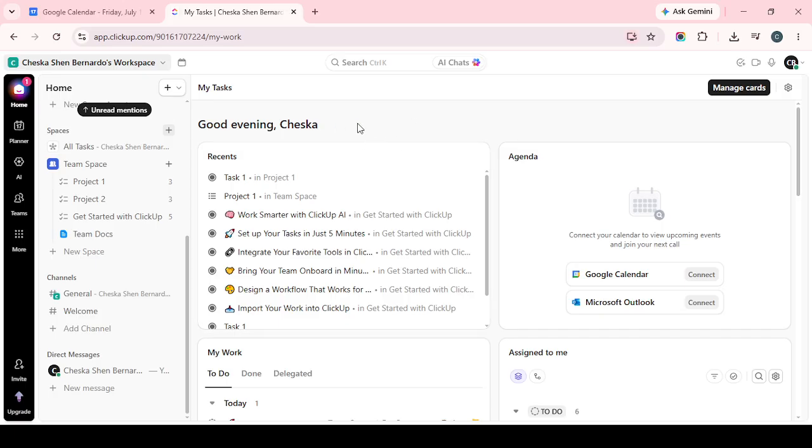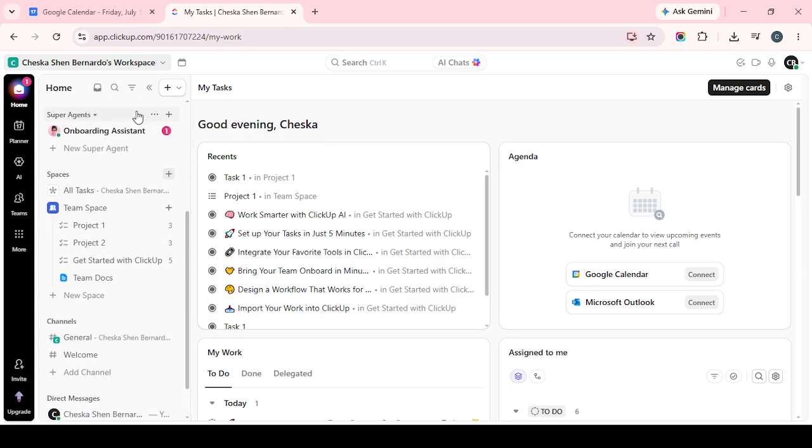By opening your Asana project in Chrome, using the drop-down next to the project name, selecting Export/Sync, and choosing Sync to Google Calendar, you can quickly connect your project schedule to your calendar and keep everything easier to track in one place.